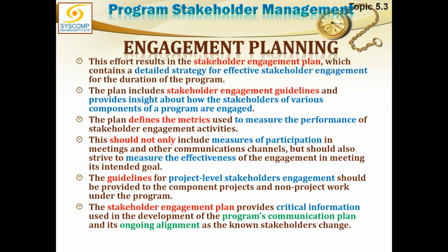The plan defines the metrics used to measure the performance of stakeholder engagement activities. This should not only include measures of participation in meetings and other communication channels, but should also strive to measure the effectiveness of the engagement in meeting the intended goals.